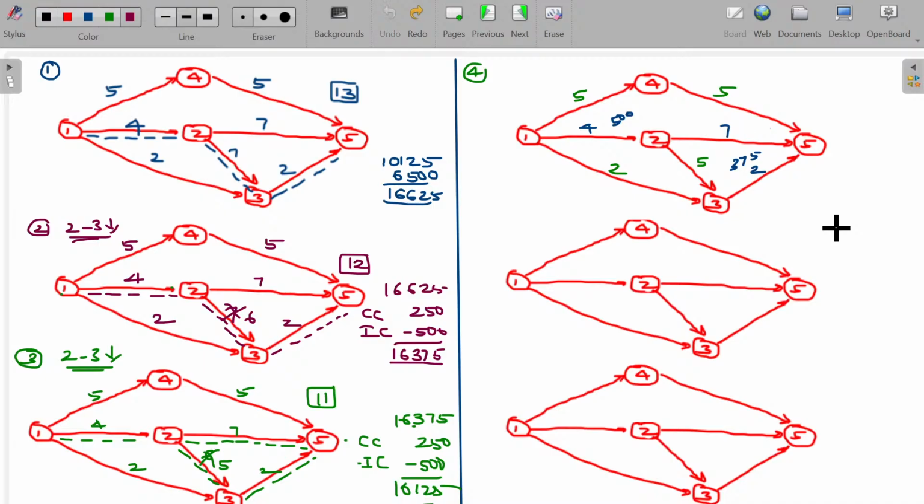Okay, logically correct. So here activities 1 and 2 are reduced by 1 day. Then this 4 becomes 3 days, and the rest of the things remain the same. Now the critical path being this one, 3 plus 7, 10, 3 plus 5, 8 plus 2, then also 10, then also 10, and the non-critical path of this one, 1, 4, 5 also becomes critical now. Only the activity 1 to 3 remains non-critical.